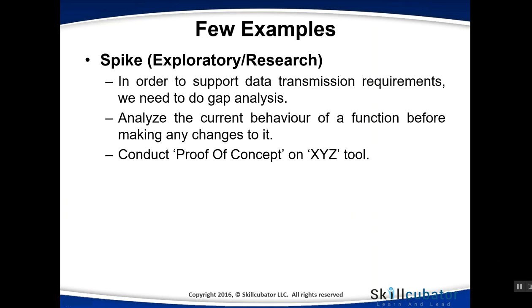A spike is exploratory or research-based work where we don't know how something will work and want to invest time to learn about it. For example: performing a gap analysis of the current state versus the future state to support data transmission requirements, analyzing the current behavior of a feature before making changes to it, or creating a proof of concept on a specific tool, language, or component before deciding on it. We are trying to explore, research, and learn about that piece before we can implement it.